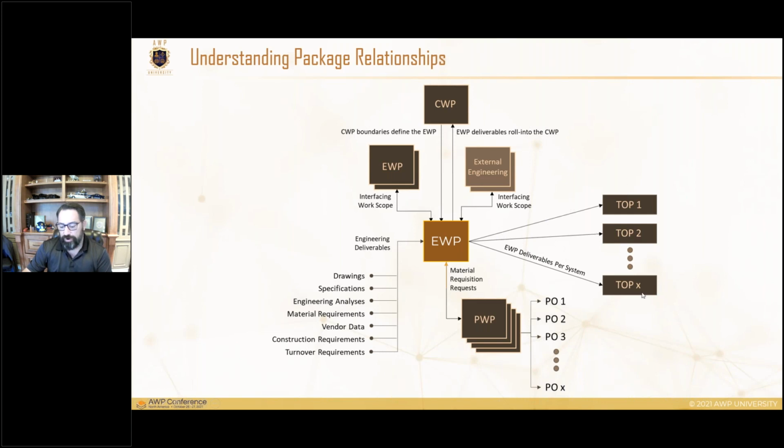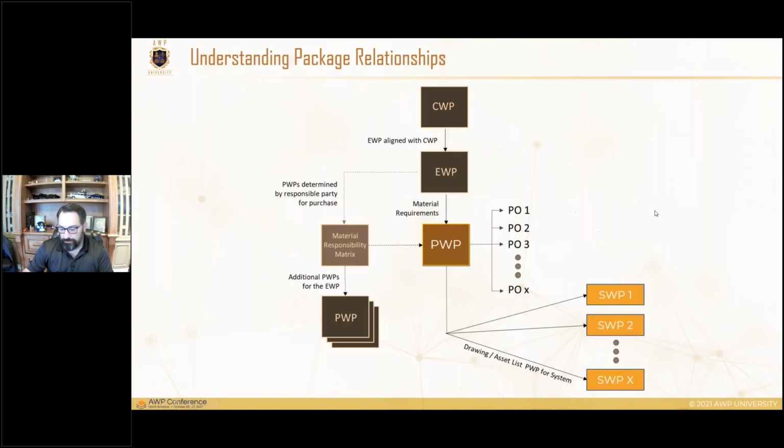That is a requirement to identify the constraint relationship between those, because obviously engineering delivery of information to the field for execution will heavily affect our ability to turn it over. So we need to ensure that we have that mapping and understand the implications of delay or inaccurate scheduling to those turnover systems. All right, so that's the basis of the EWP. We're now going to look at the PWP. And there again, we look at that as kind of a grouping of data.